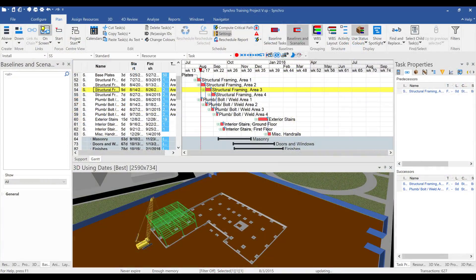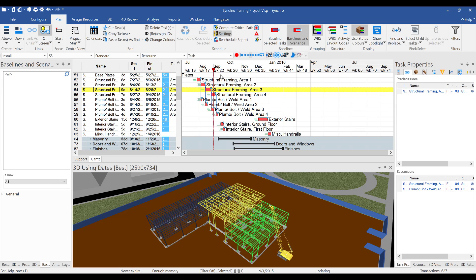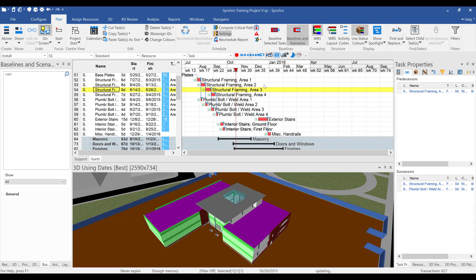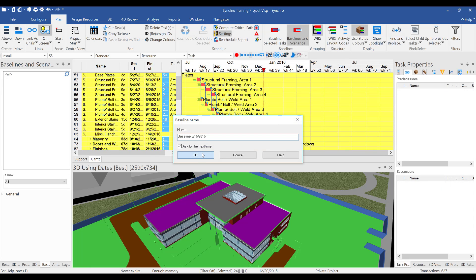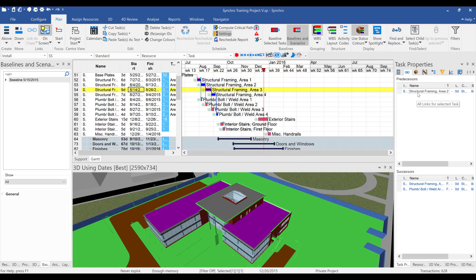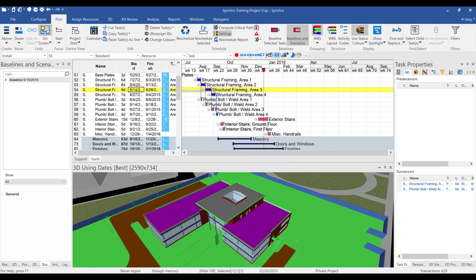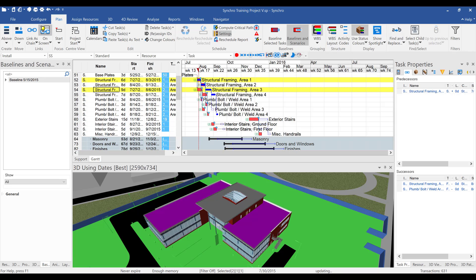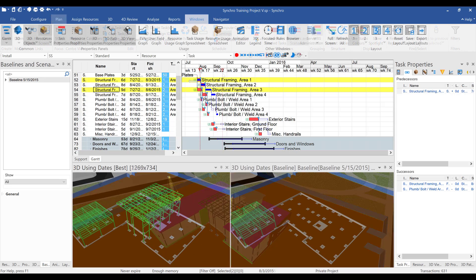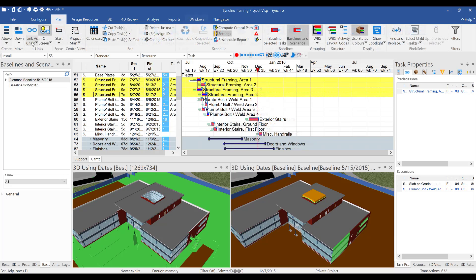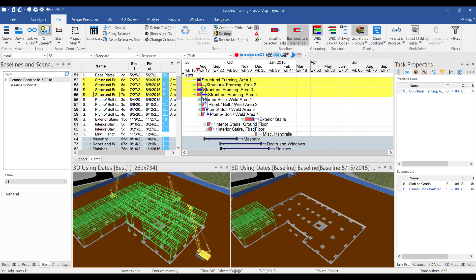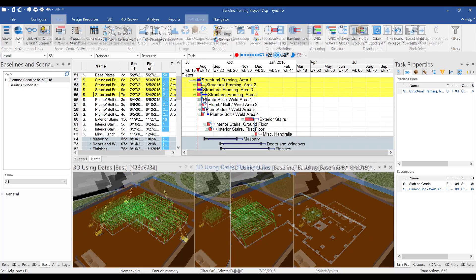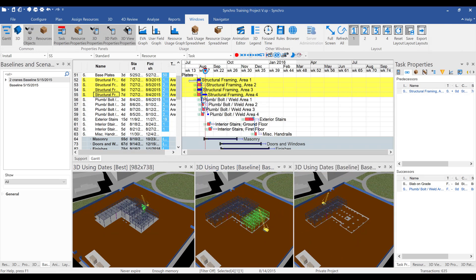After addressing the obvious mistakes, it's time to look for other improvements. This is done by capturing a baseline and then trying out different sequences. For example, see what happens if you use 2 cranes instead of 1. And if you try out a specific sequence that actually requires 4 cranes, then you guessed it, Synchro will actually show you that you need 4 cranes for that sequence.